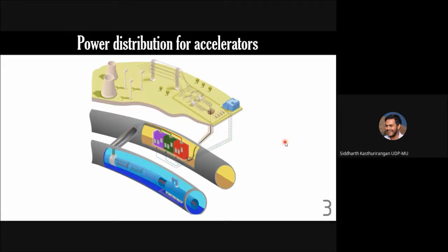And this is all part of the design phase of the accelerator, right? Because after designing and building the building, you cannot now say, "now change this for me" kind of thing. You cannot do that. So a lot of planning goes in for the power supply and its distribution in the accelerator. Okay.